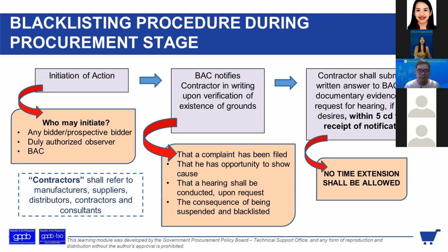Kasi, if you will notice, a blacklisting procedure is separate, no? Is separate from the penal at civil. Ito administrative lang din. So, for this purpose, multiple violations in a procurement project as grounds for blacklisting shall be included in one project. Kahit ilan pa yung violation nila, isang complaint lang yan. Although it shall be considered as separate offense. Isang complaint lang ang isa-submit ng complainant. But once proven, it could be already considered as separate offenses. Iba-ibang penalty. Lalo na pag di na-absorb yung isang offense sa ibang offense.